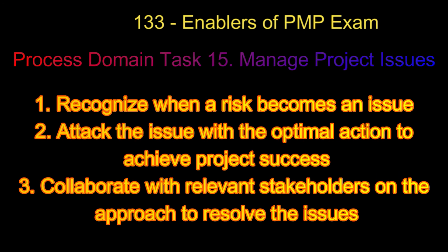Process domain task 15. Manage project issues. This task has three enablers. First, recognize when a risk becomes an issue. Second, attack the issue with the optimal action to achieve project success. Third, collaborate with relevant stakeholders on the approach to resolve the issue.